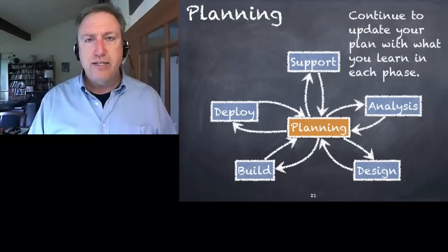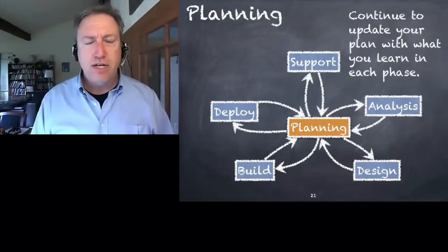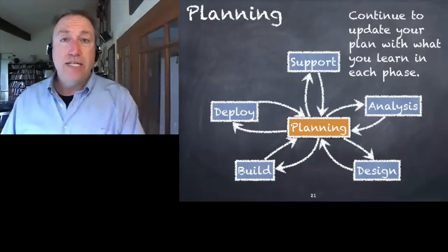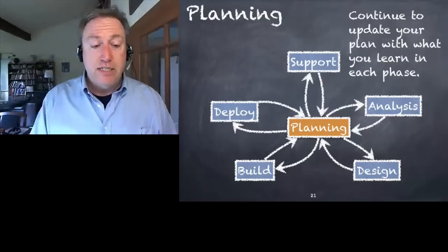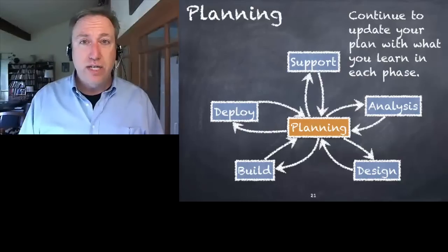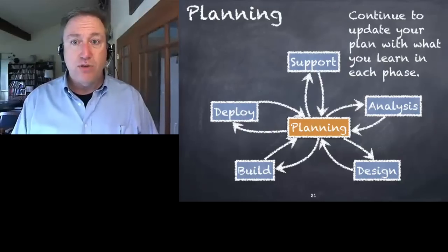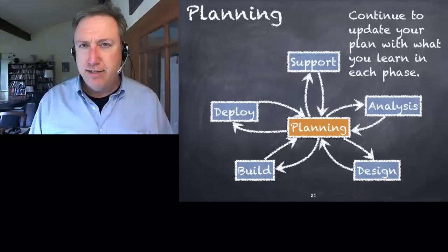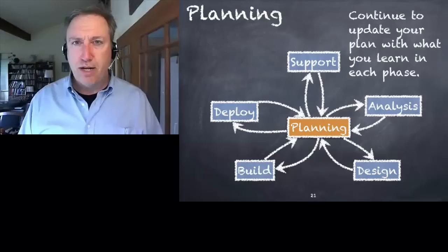So you go through your analysis, you sit back and you say, okay, how long is this going to take us? What is it going to take? Are we going to succeed or not? You go through the design. You find out, well, is this technically feasible? Can we do this with our current budget, our people, that sort of thing. Each time you look at it, and you have to make that hard decision, should we continue with the project?